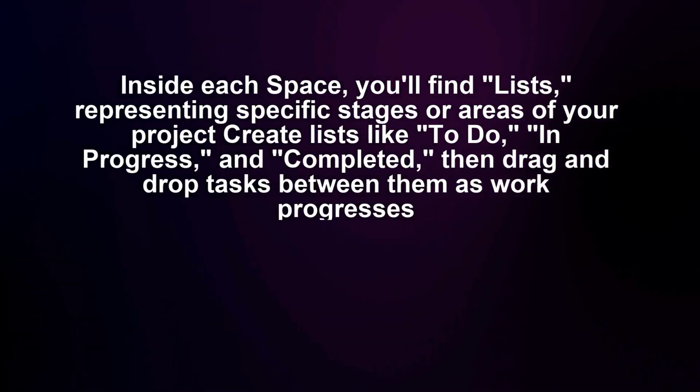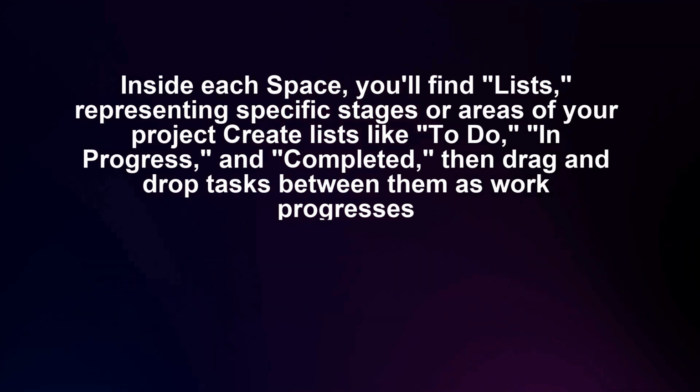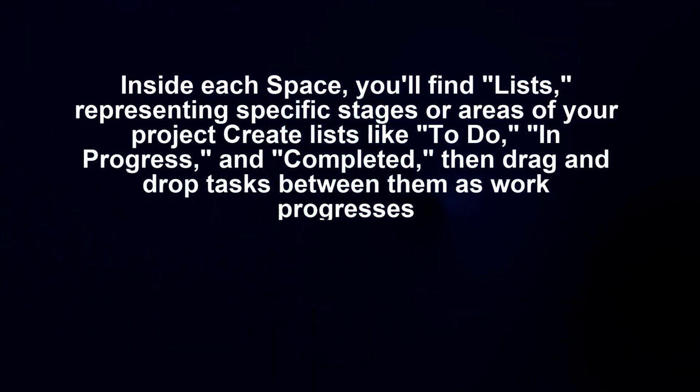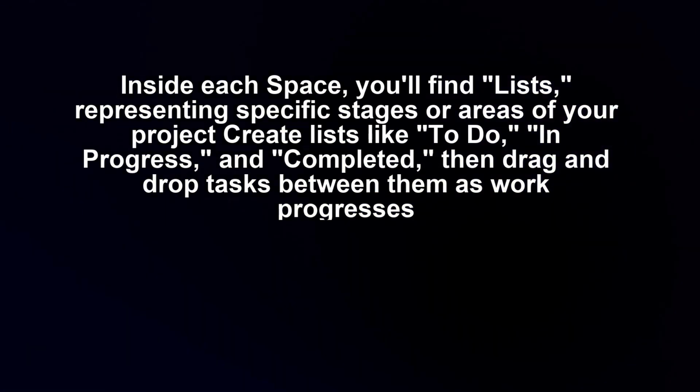Inside each space, you'll find lists representing specific stages or areas of your project. Create lists like to do, in progress, and completed, then drag and drop tasks between them as work progresses.